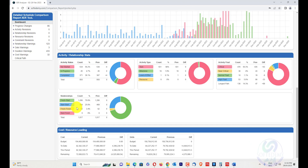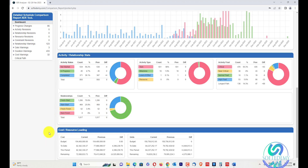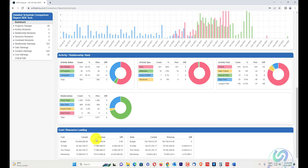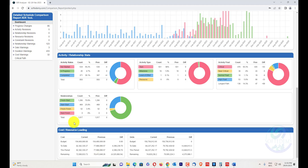Relationship types include the four types: finish-to-start, start-to-start, finish-to-finish, and start-to-finish. If there's a recovery schedule using a fast-tracking technique, there may be changes in finish-to-start relationships visible in the pie chart. Cost and resource loading is also shown — this includes budget labor units, budget non-labor units, and the total project budget cost. The difference in to-date cost between current and previous updates was 4.3 million.